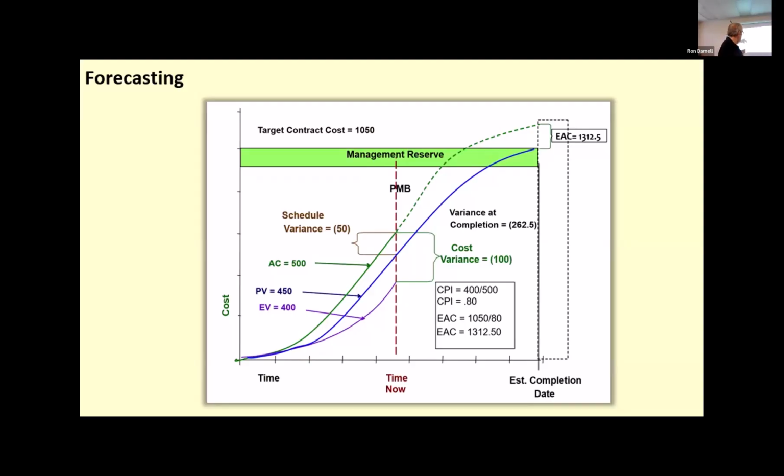It may be that there's been enough change in here that we can build that in. Now, if you've got proper change management, you would update this baseline to reflect that change management, right? So it doesn't mean the baselines have to be permanent, but it has to be a deliberate decision to add change scope. Say you found out something that you didn't anticipate, got to be done.